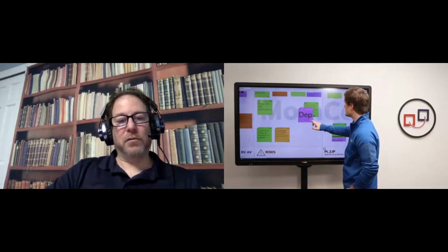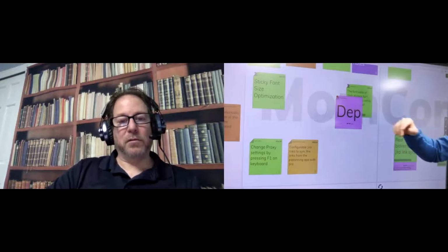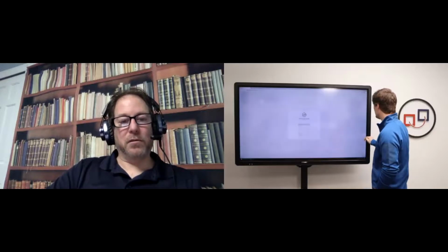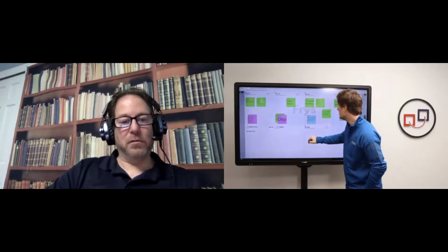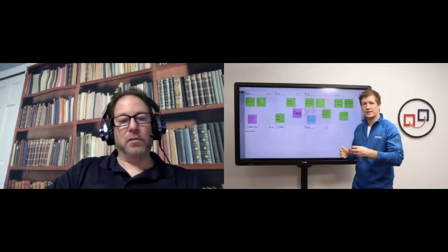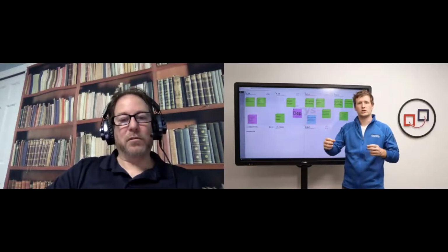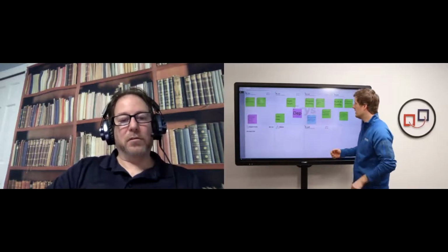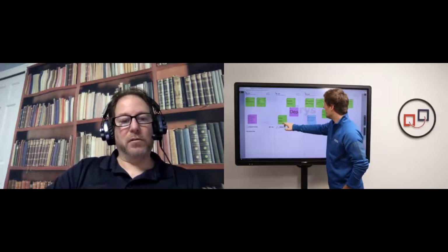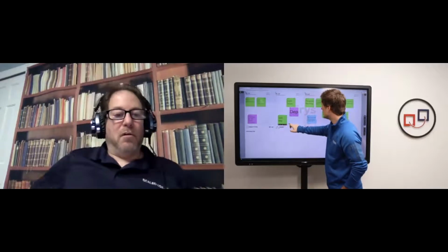So as soon as I make that transparent to the other team, and I think that's what you're saying, on the PI planning app, it gets a red flag. And at the same time, if I now go to the other team, I will get the dependency on it. So both teams are aware that there is a dependency. And now, one team member each talks to the other about how we are going to solve that dependency. Of course, this team will probably have some user stories solving the dependency.